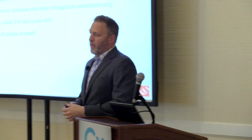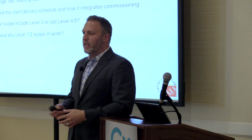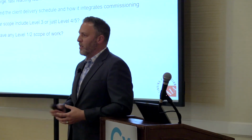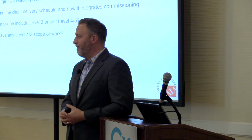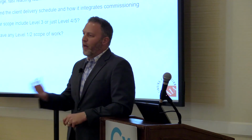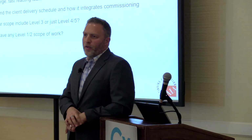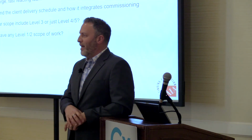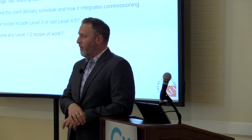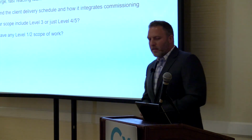Understand the client delivery schedule and how that incorporates into commissioning. What I'm talking about there is while you're doing your level 4 and level 5 commissioning, you have load banks in the data hall, but the end user wants to start bringing in racks for early turnover. How is that going to affect your layout and your commissioning plan? So if you define your commissioning plan, again, during level 1 and level 2, you're coordinating and communicating with your end user. They understand where you're going to be, and you work through your owner's rep or your CM to limit access.